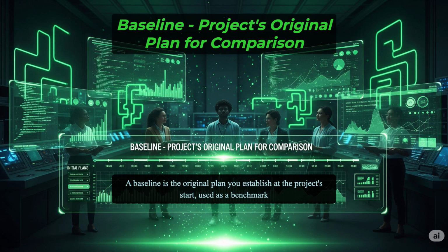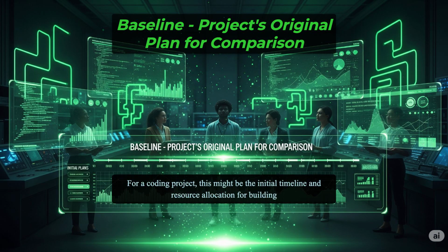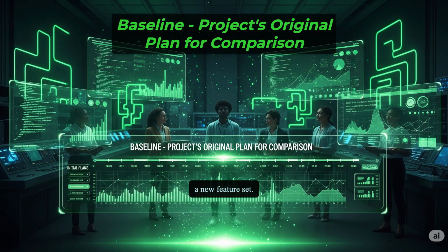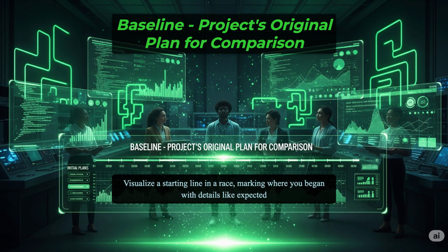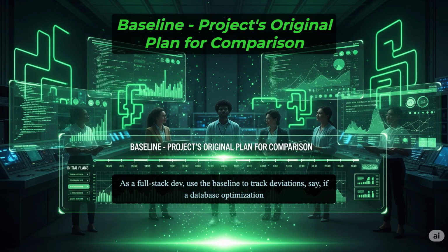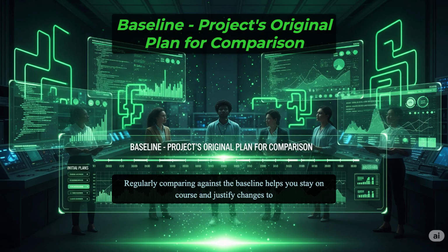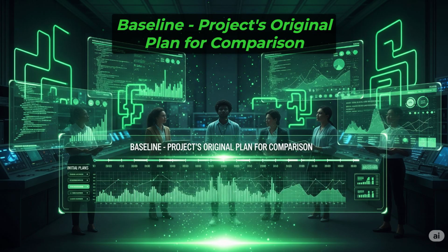A baseline is the original plan you establish at the project's start, used as a benchmark to compare progress. For a coding project, this might be the initial timeline and resource allocation for building a new feature set. Visualize a starting line in a race, marking where you began with details like expected completion dates and budget. As a full-stack dev, use the baseline to track deviations, say, if a database optimization takes longer than planned, and adjust your strategy. Regularly comparing against the baseline helps you stay on course and justify changes to stakeholders with data-driven insights.